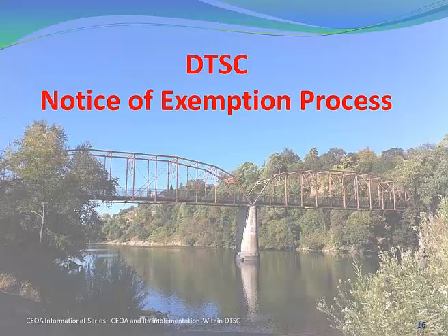Even though you may feel that the project fits an exemption, and perhaps it does, you first need to rule out potential effects such as unusual circumstances, effects to biological resources, cultural resources. Wherever you have an excavation in California, unless you're digging into soils that are non-native, there could be a potential for buried cultural resources, and any other number of factors.